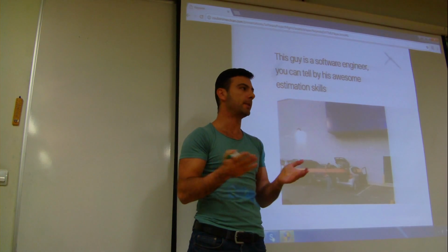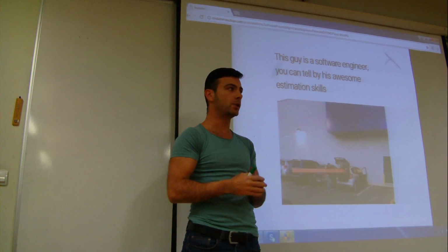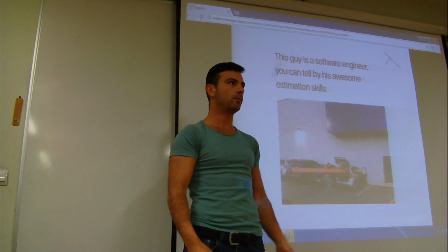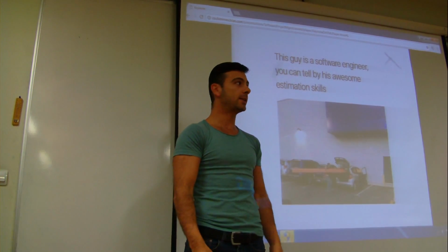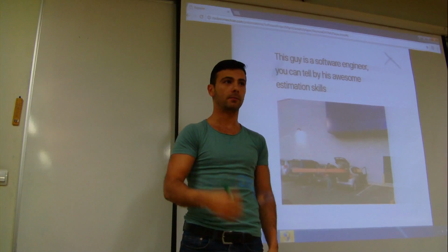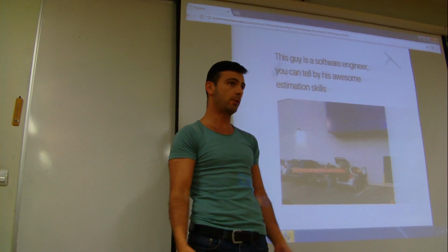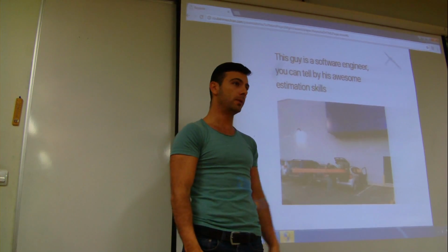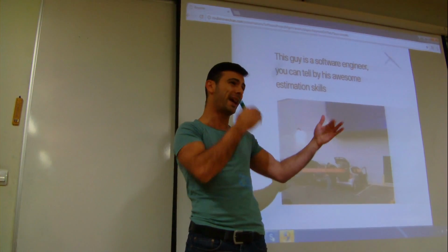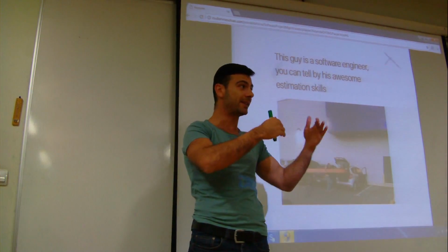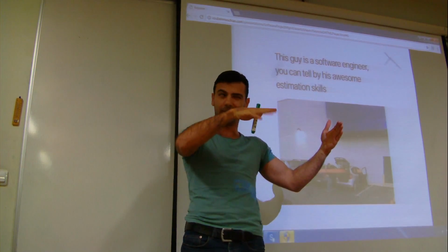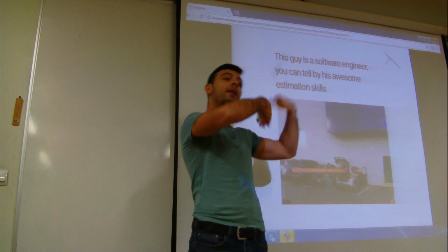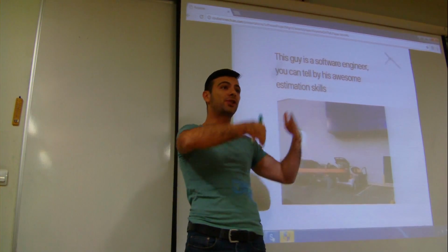And so what has happened? Well, what people have done is, wait, instead of making long-term estimates, why don't we make short-term estimates? Well, what's a short-term estimate? I don't know, 2 weeks? 3 weeks? Okay, so let's make an estimate, figure out what we want to build in roughly that amount of time, roughly, by the way, because even the 3-week estimate might be off. Build it in that time, and then do another estimate and build, and these are called sprints.